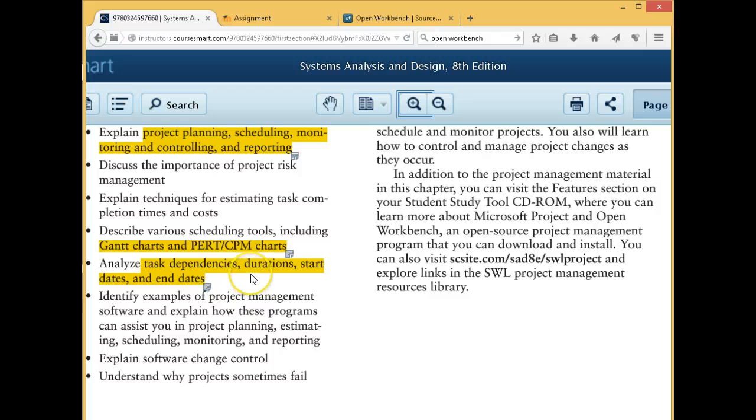And it doesn't have to just be people that are working on projects. It could be machines, machine time if it's a manufacturing kind of thing. You can assign resources. And that's something that the book doesn't mention in this case, but we'll take a look at that as well. Very useful for helping people manage multiple projects or membership in multiple projects. You can say, okay, I've got this person 50% of the time, and here's how that will affect my schedule.